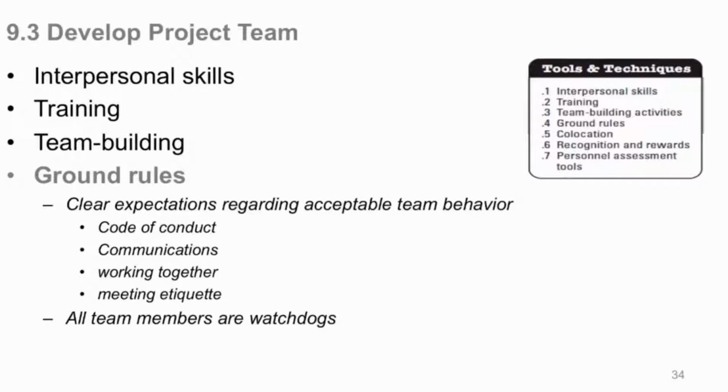And this could even get into your communication management plan of what they are not allowed to do. For example, maybe they can't use their cell phones to communicate to people, chat. It's really nice, fast, but you have no record of that. You need to keep records of your communications because you don't want your staff, even though it's the best intent and the end result may be okay, you don't want them making commitments on a cell phone to somebody where you have no record of that. So you need to set rules on what is acceptable communication.